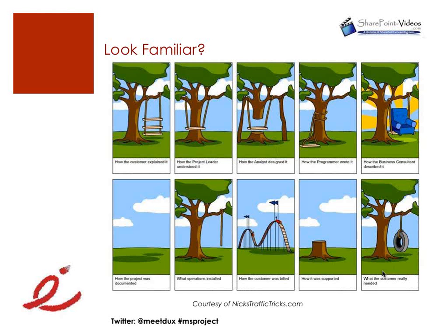And one of the key culprits I experience in a lot of project environments is, you might sound crazy, the lack of a standardized process on how you run projects, as simple as that. When I say lack of standardized process, I'm not being preachy and academic, saying you have to be CMMI or ITIL. No, it could be a 10-step process on how you manage or run projects. It could be as simple as, during project initiation, this is step 1, this is step 2. A lot of organizations lack that.